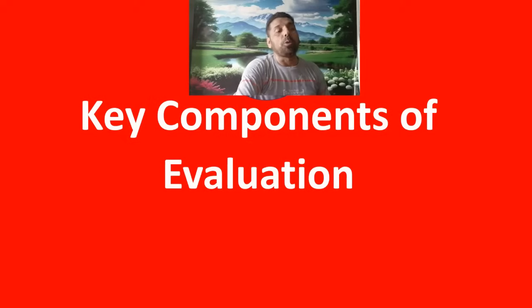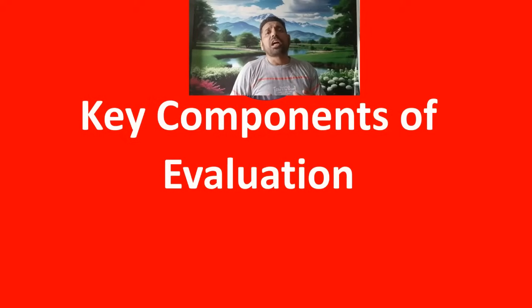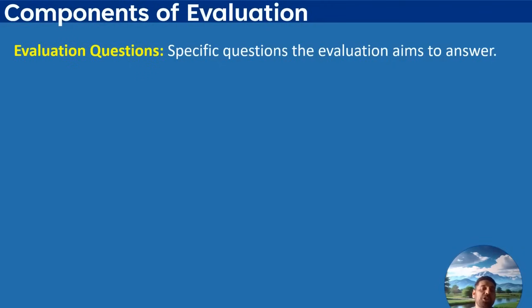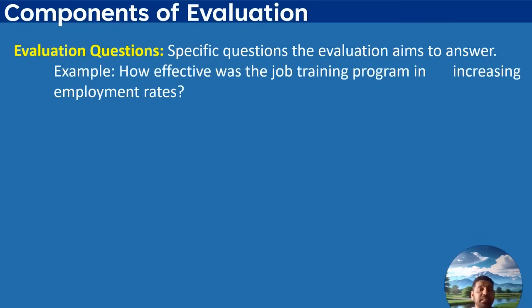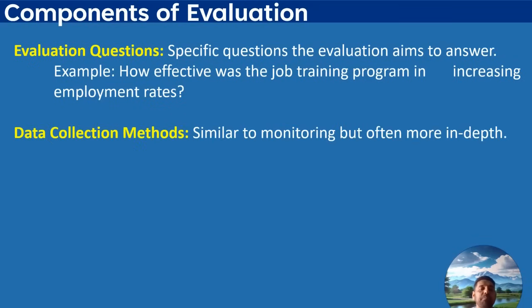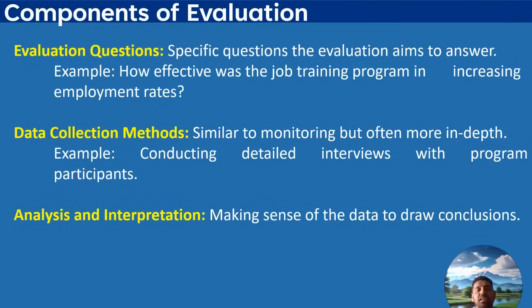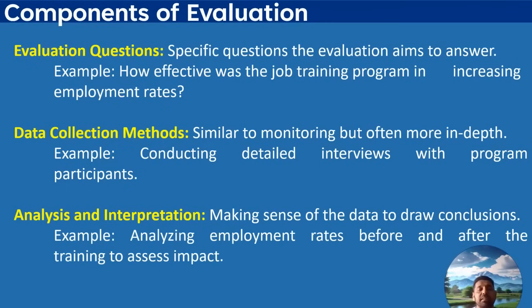The components of evaluation focus on evaluation questions, data collection methods, and analysis and interpretation. Evaluation questions are specific questions the evaluation aims to answer, for example: how effective was the job training program? Data collection methods are similar to monitoring but often more in-depth, such as conducting detailed interviews with program participants. Analysis and interpretation involves making sense of the data to draw conclusions, for example analyzing employment rates before and after the training to assess impact.